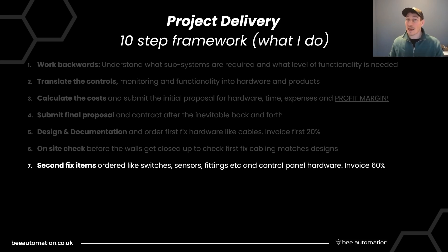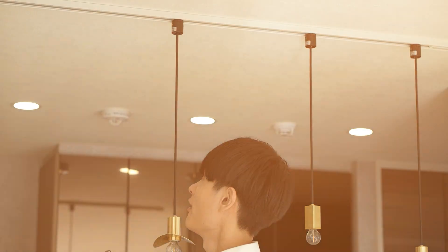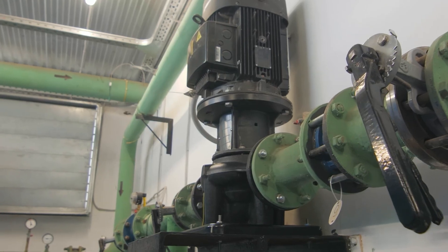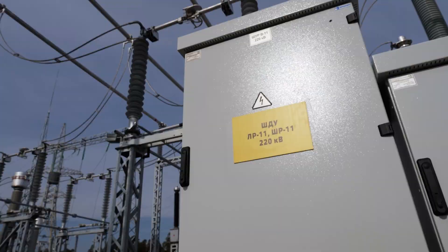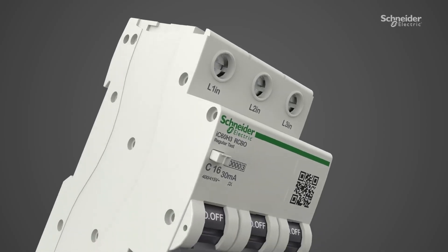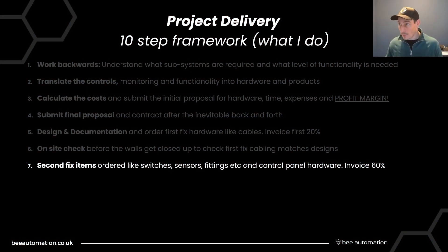Step seven is ordering all second-fix items and panel hardware: field devices like light fittings, switches, motion sensors, valve actuators, CO2 monitors, as well as panel enclosures, PLC modules, terminal blocks, cable, RCBOs, and so on. This is a hefty part of the project cost, so at this point I invoice around 60%.